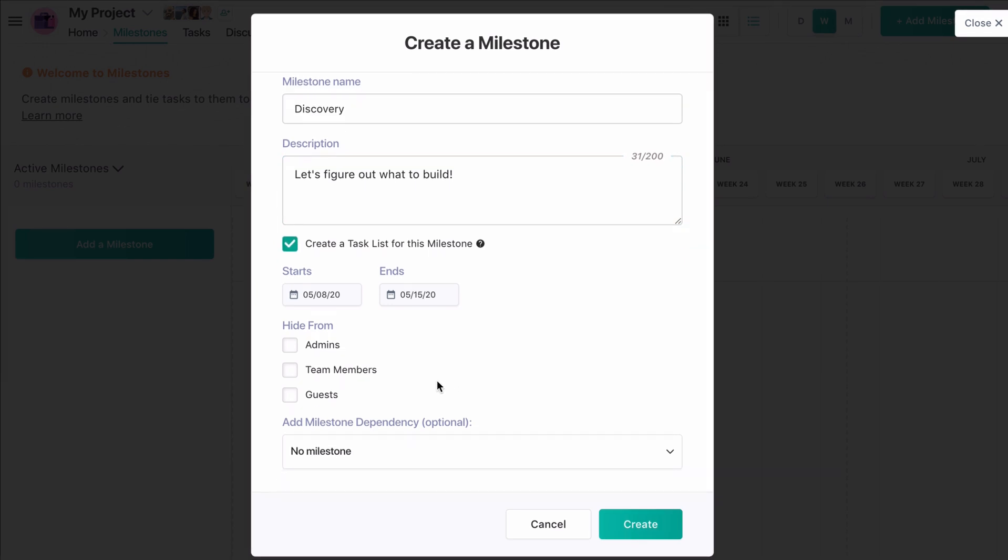We can choose to hide this milestone from people on our team or guests. Hiding a milestone will automatically hide all of the tasks that are tied to it. In this way, hiding a milestone from guests is a popular way to run internal deadlines alongside delivery deadlines in a client project.